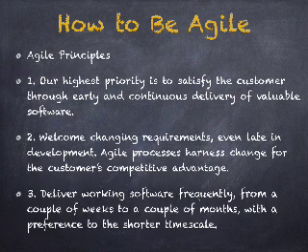And the second principle says we are supposed to welcome changing requirements even later in the development phase. Agile processes harness change for the customer's competitive advantage. Imagine you've got a software development and you started with development after receiving all the requirements from the client place. In the traditional approach, you will freeze on the customer's requirement, call it the customer requirement specification document, SRS, and this requirement specification document cannot be modified after we start our plan. So the requirement is frozen, and then we start with the design phase, and then we move on into development